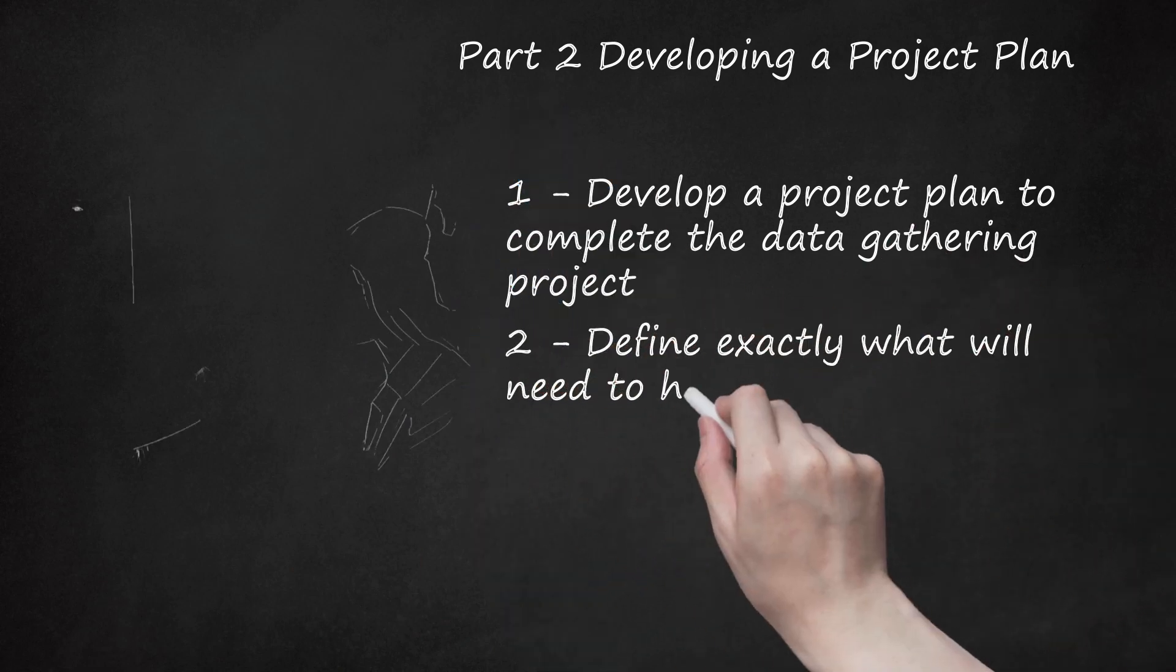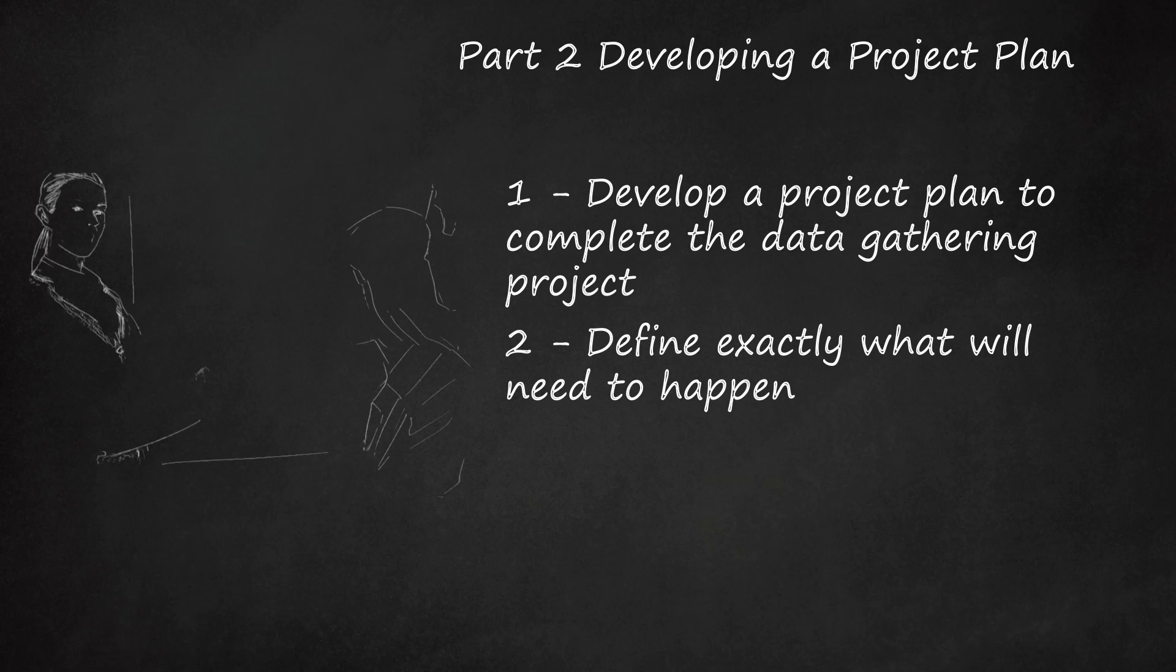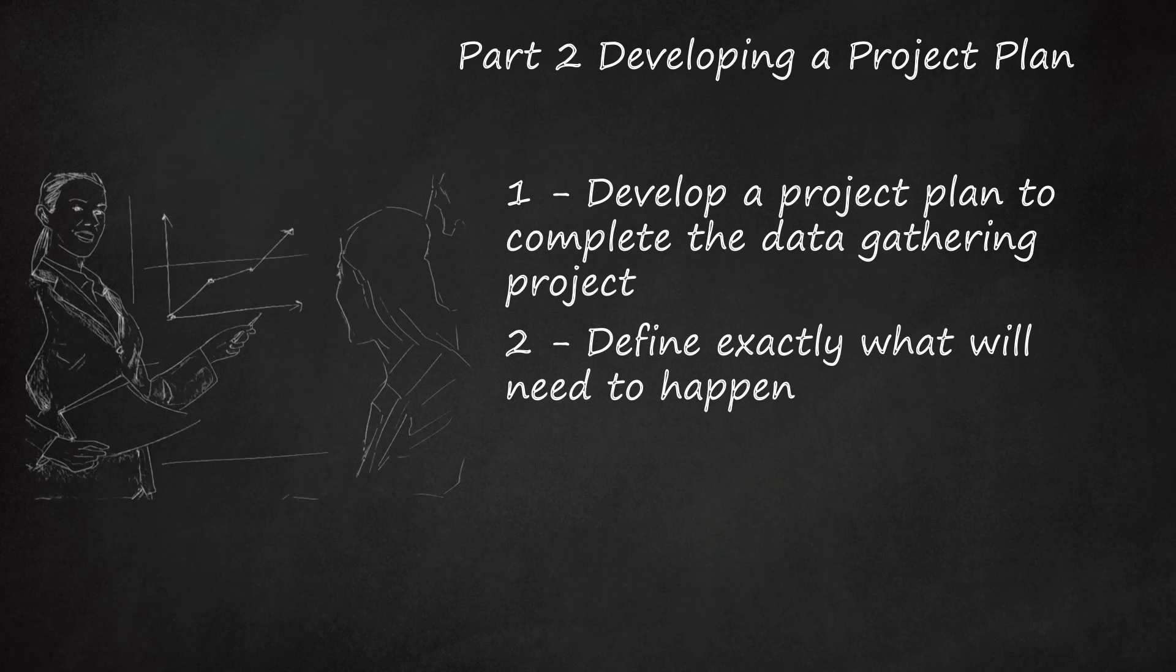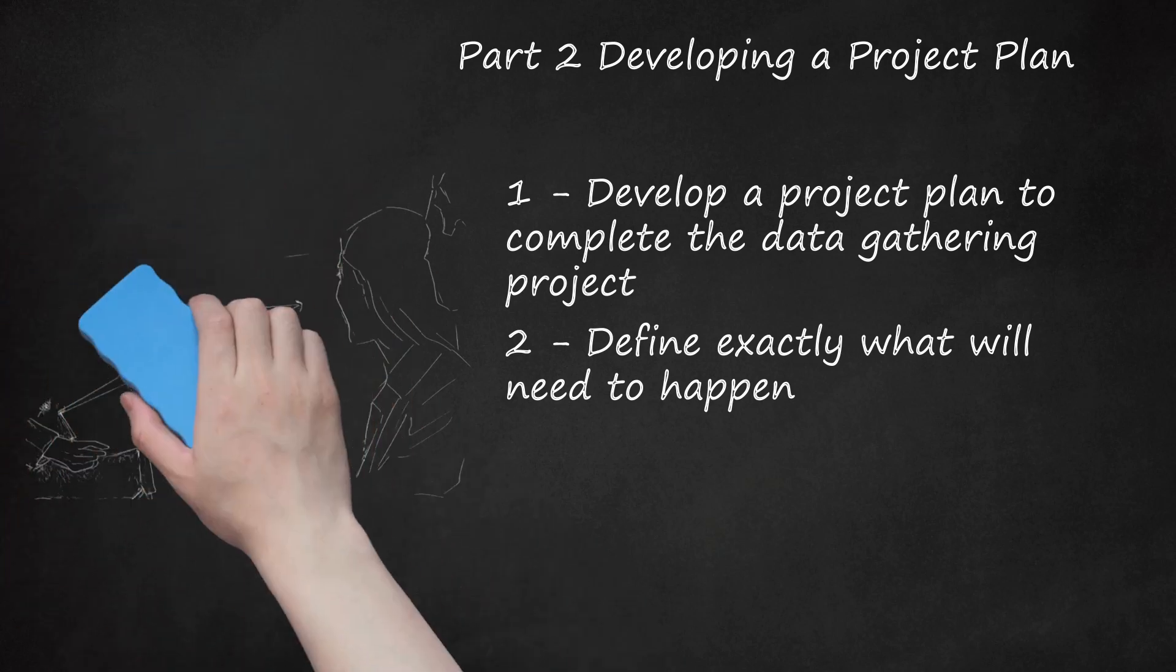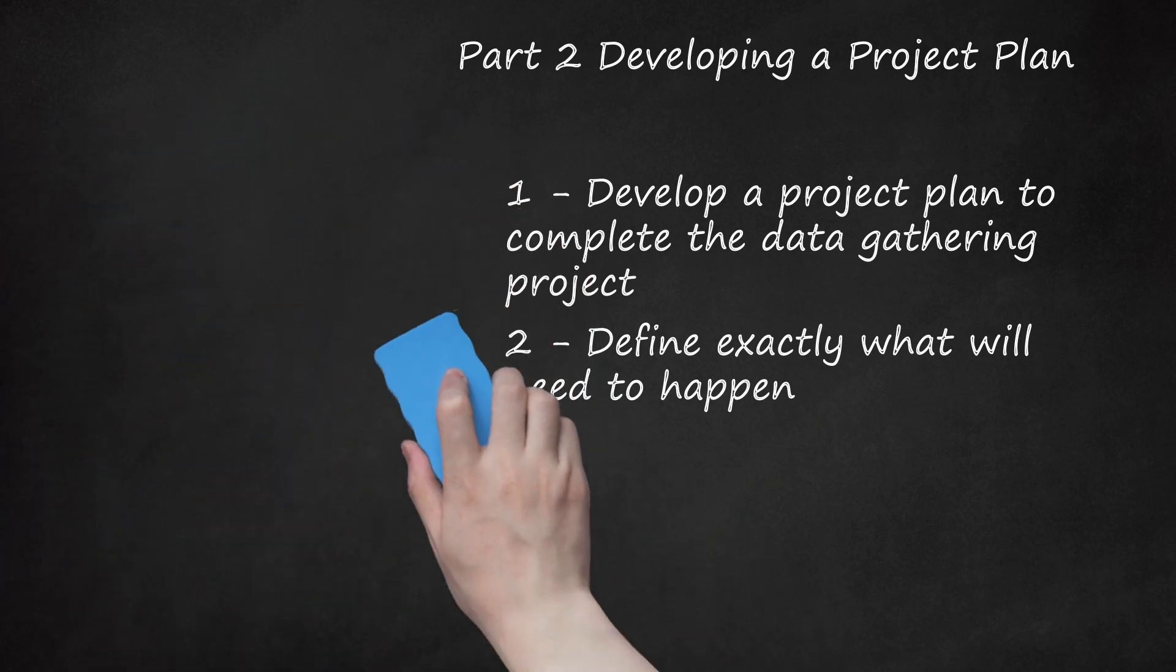Step 2: Define Exactly What Will Need to Happen. To bring about this project, you will need to define what exactly the company needs to do. For example, if the problem is that costs of a product are too high, the areas covered will include purchasing, production, packaging, shipping, and accounting, among others, to determine the current and past trends in costs of materials, production cycles, and cost.